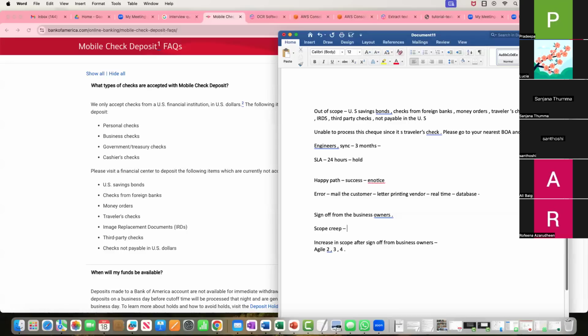So what you will say is, we cannot accept this change in requirements now, but what we can do is you submit a new intake request. Submit a new intake request with all the requirements, and please submit it in Jira. Submit the intake request, and that's called the change control process. And I have to discuss with my whole scrum team, not only with my developer, with my scrum master, my product owner, and my manager. Then I will come and tell you whether we can do it or not, and if we can do it, what is the money involved and the timeline involved.